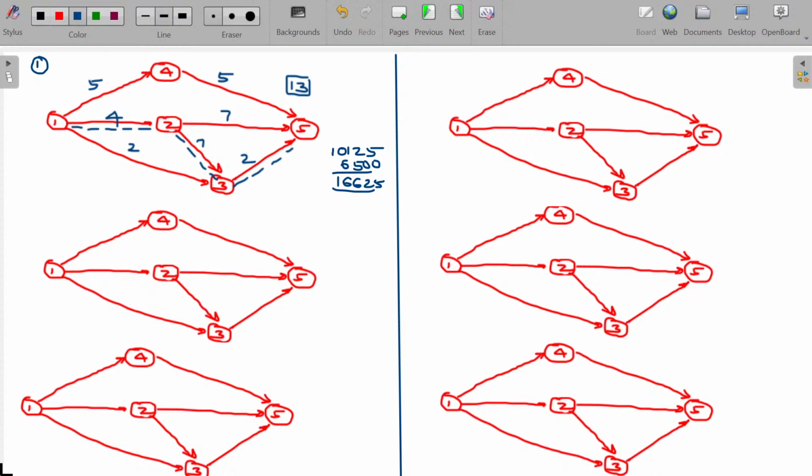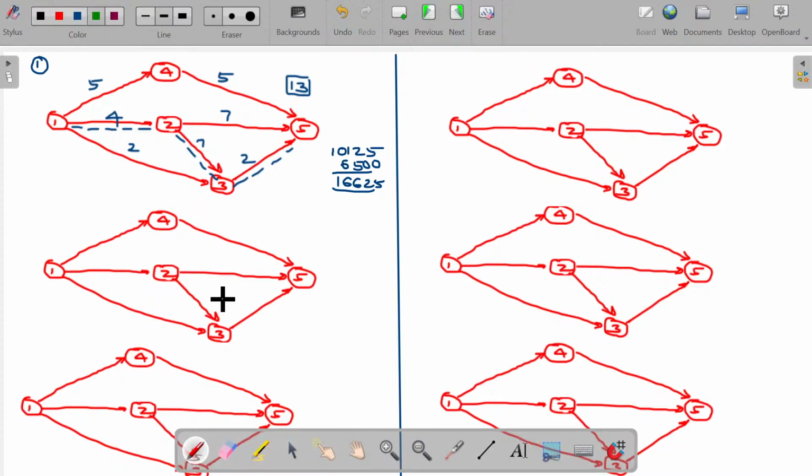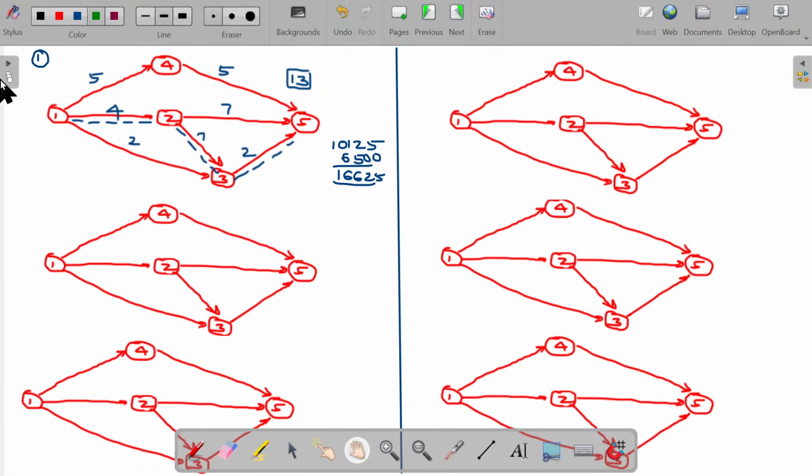Now the question is, can we reduce the time? In order to reduce the time, hope now we'll be able to understand this one, right? So here I introduce the cost where the two costs are there. One is direct cost, another is indirect cost. Indirect cost is based on the duration. Direct cost, no other way. If you want to complete the project, that cost will be incurred definitely. Clear?